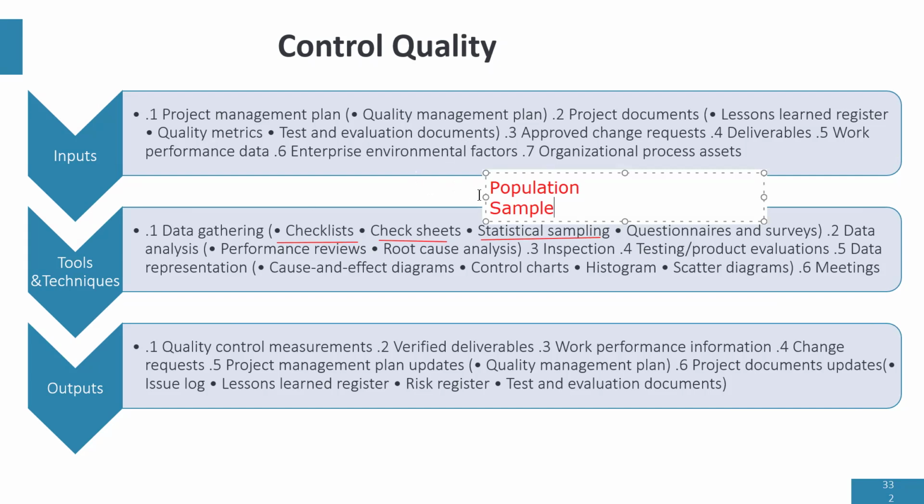So what does population testing mean? Population testing means that you test every product you create. Sample testing means that you don't need to test every product you create, but you must have a sample test. Now, there are some products that by nature we have to test every one created, like airplanes. You can't afford to do sample tests. And in sample testing, there are some guidelines.